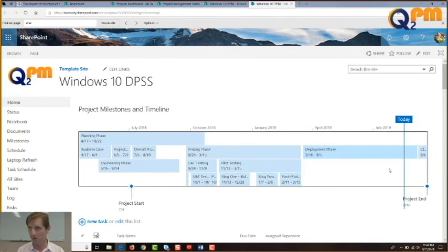Also, as of now, begin to expect every 2 weeks from me, on my Friday, a status report. The status report is a simple email that gives you a summary of our status. You'll see a color-coded health report. Green means healthy, yellow means at risk, red means we're in trouble, and also a list of what we completed, what's coming up, and any issues that may exist.